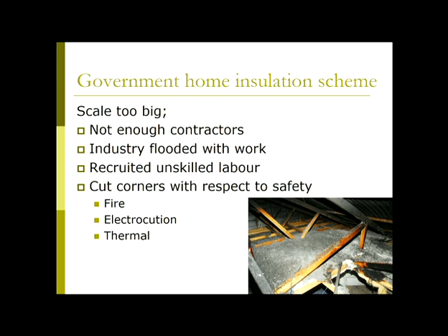There also weren't the resources available to put all that insulation into hundreds of thousands of roofs. So it wasn't just bats that were going in, it was also things like aluminium foil. All sorts of things were going in, some of which had more risks associated with them than others. Things like nailing in place aluminium foil and hammering nails into electrical conduit. A couple of people died in that way. So overall there were 4 or 5 people killed in the insulation industry, some as a result of electrocution.